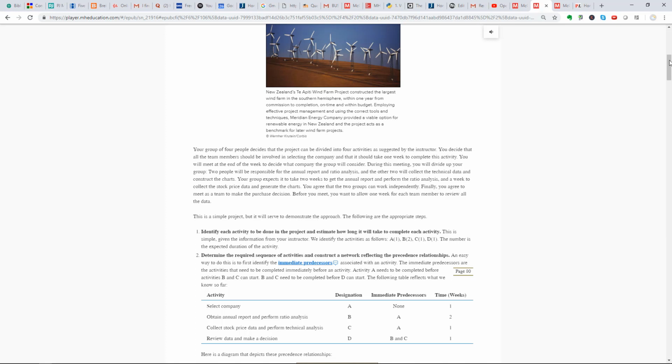Okay, so let's think about that a little bit, and the fact that A takes 1 week to select a company, and then B takes 2 weeks to do the fundamental analysis on it, and C takes 1 week to do technical analysis on it, and then when we get to D, putting all that together, it takes another week. So let's start drawing that. That's what we do here for CPM. We draw the activity network.